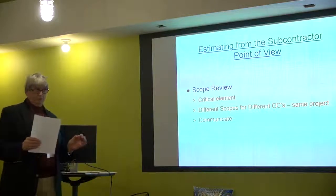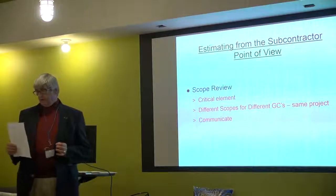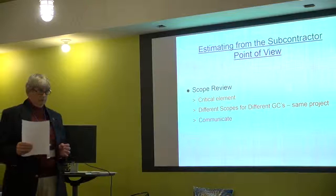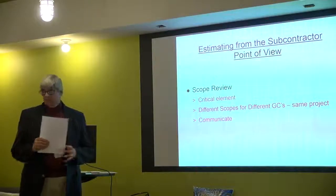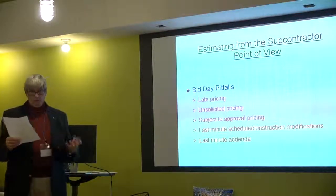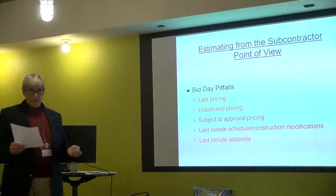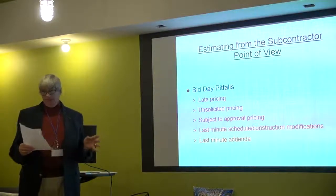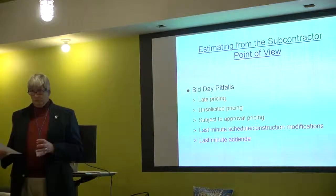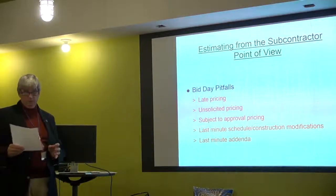There may be alternatives out there for you. Substitute packages, you've got to be real careful of that. A lot of architects and engineers require prior approval in writing up to 90 days prior to bid time to make sure that you're providing the correct package. You've got to wade through that, make an educated guess, make a phone call if you have time, but ultimately the decision to go with a particular package is absolutely critical. It means whether you make money or lose money on the front end of your project. Definitely don't want to be in a negative position.